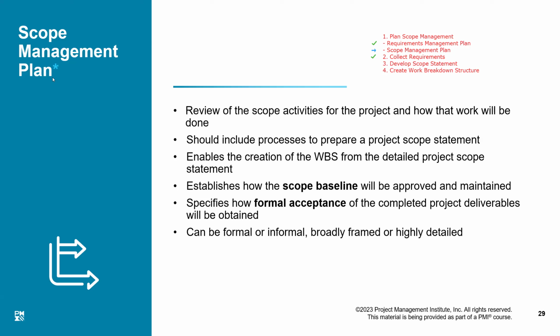Once that is done, the scope management plan also tells us how to further break these things down into work breakdown structures, I mean, the breakdown to the work package level. We'll talk about that. Once all of these things have been done and work packages are defined, then we should baseline the scope. The procedure for doing that is given here in the scope management plan.